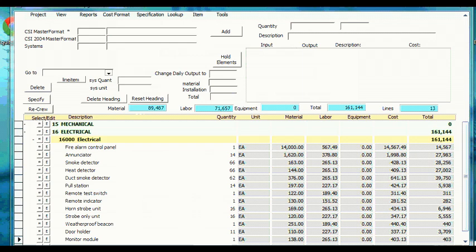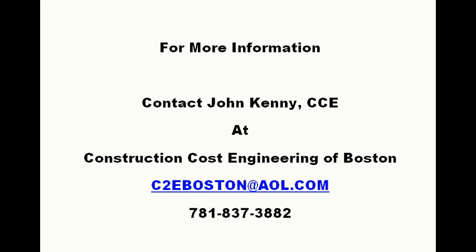So what we've done is two estimates. One on very little information, one with counts. So what you just saw was a production of a budget estimate from very little data, just a square foot number, and then using that estimate as a template for a design drawing estimate when you had some actual counts from the drawings to produce a second estimate.